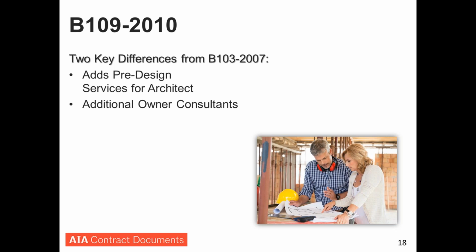When we went out to the market and asked practitioners what characterized these large multi-use, multifamily kinds of projects and differentiated them from other things that they might do, they described the need to conduct site analysis and pre-planning kinds of activities that heretofore had gone uncompensated. They were being done but weren't being represented in the contract. In a B103 or B101 environment, you can provide those services, but they are additional or supplemental services, not part of the basic agreement.